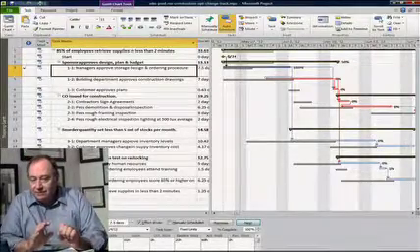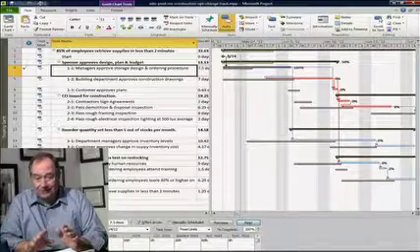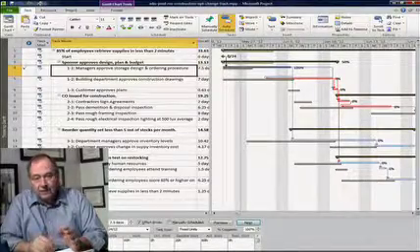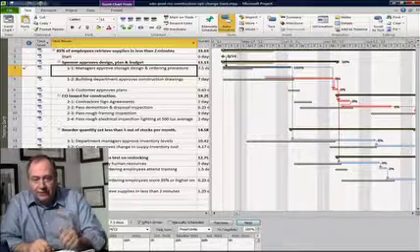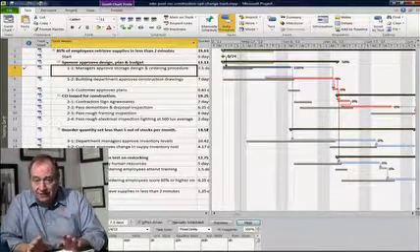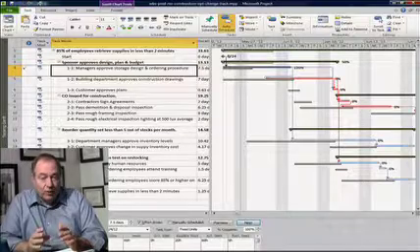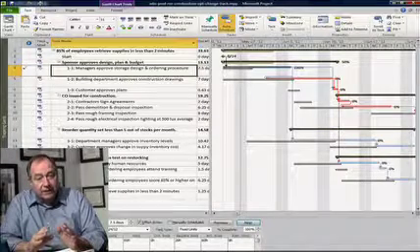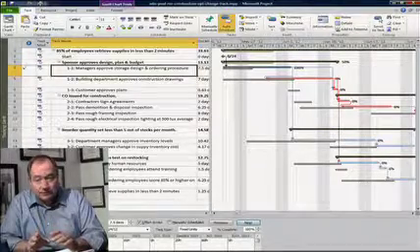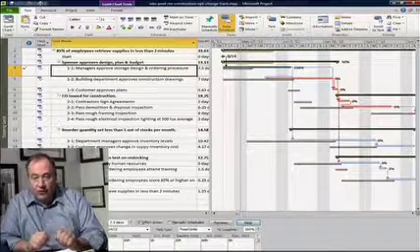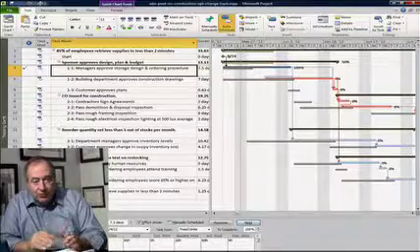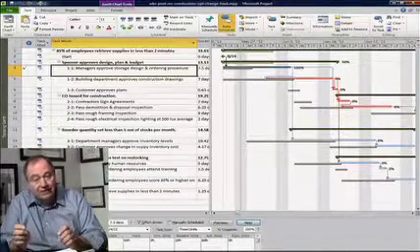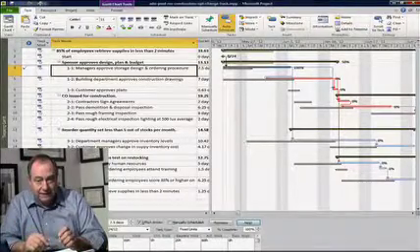And notice the updated Gantt chart is quite different. It's the tracking Gantt. Each task now has two bars in this tracking view. The gray bar is the baseline start and finish. The red or blue bar is the current actual schedule. Notice the overrun on task 4. The delay on task 4 has pushed that project's finish out a week later than the baseline.